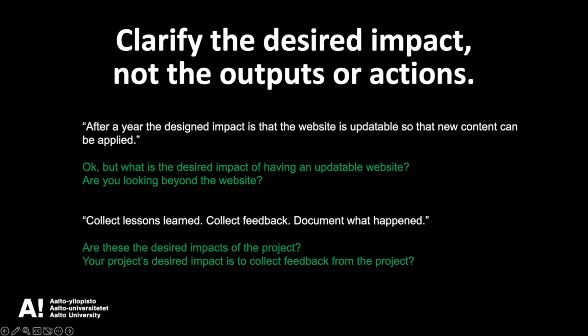Or another result from you was that some team or some person wrote that in the following months, we collect lessons learned, we collect feedback, we document what happened. Yeah, but that's not really outside your project, is it? Are these the desired impacts of your project or things that you probably want to do after the project? Because if these are the desired impacts, then it would mean that your project's desired impact is to collect feedback from the same project. Probably not.